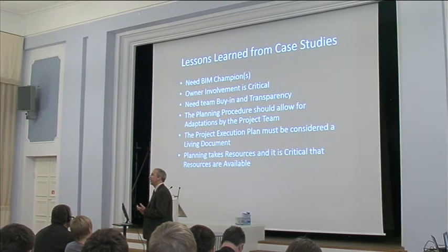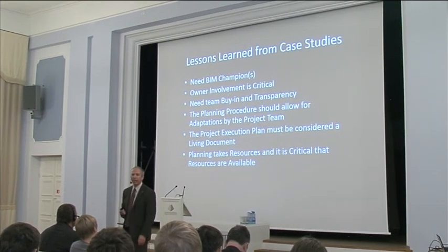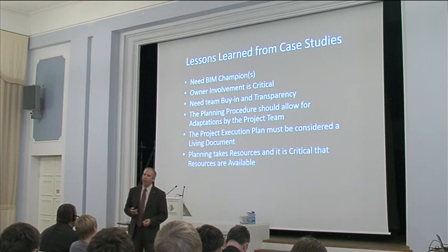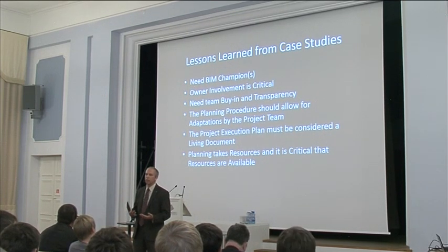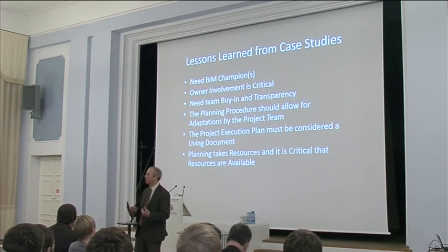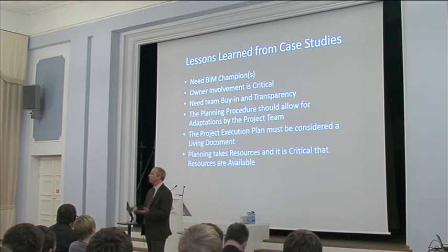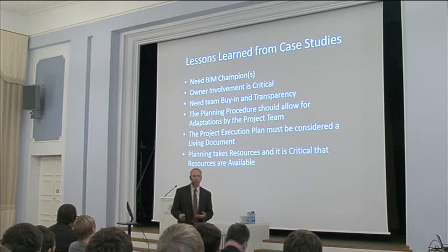And you hear them say, we don't have time for that, we need to start modeling. And then what happens is they create a model that is of no use to any downstream participants. And so the important thing is, at the very earliest stages, when we know it's difficult, because you need to get started with other things as well, to be able to set aside enough time to do this process.